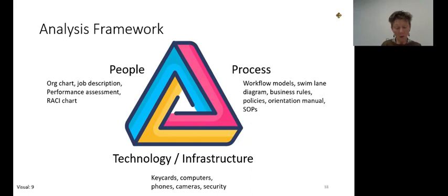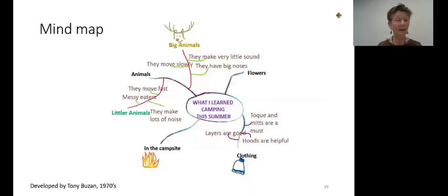As you're working on a process, or when you're working at implementing a change, you're putting something into an existing system. An organization is a system, so an interconnected set of items. And there's a process that comes before and a process that comes after. So you want to be aware of, as you're fitting this in, there may be other touch points that weren't considered, didn't come out, and you say, wait, this process, actually, there's an exception process with that contract management review. There's another group over here that we need to get involved. Here's who those people are. So that's where this analysis framework can come in handy as another tool.